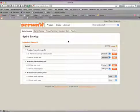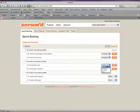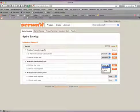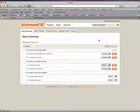Once a sprint is in progress as a developer, I can come in, I can move the tasks from to-do all the way through done. And then as the product owner, I can come in at the end, close the user stories, and then finally close out the sprint.